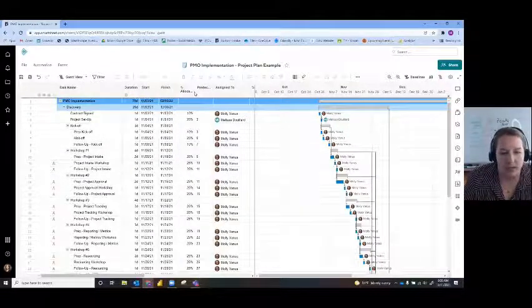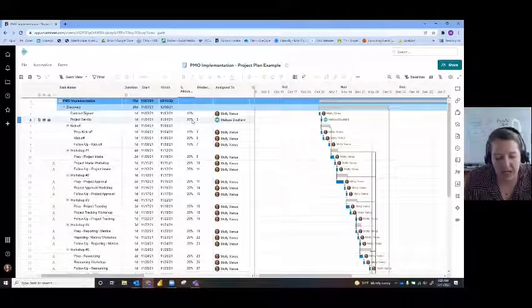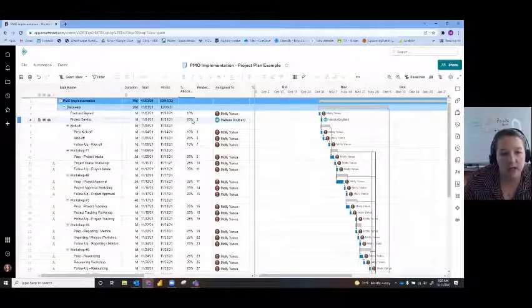I don't need that. I already have a percentage allocation. So, okay, this is a one-day task, contract signed. I don't need my whole day to get a contract signed, so I'm saying 10%, right? For project setup and configuration, I put 25%. So if I think about this, this is assuming an 8-hour day. It's going to take a couple hours for me to get the project set up, maybe, right? So I'm doing pretty quick percentage allocation.